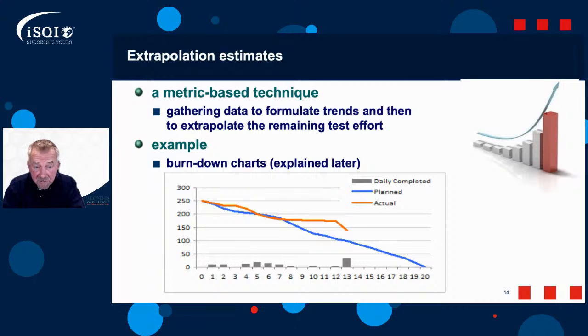It's gone downwards. Now, in terms of extrapolation, if I want to present when we're going to finish, how long is it going to take, then we take the first point of the orange, right at the start there at 0, and we take the end point of the orange, and then you draw a line and extend it, and that will extrapolate when you're going to finish.